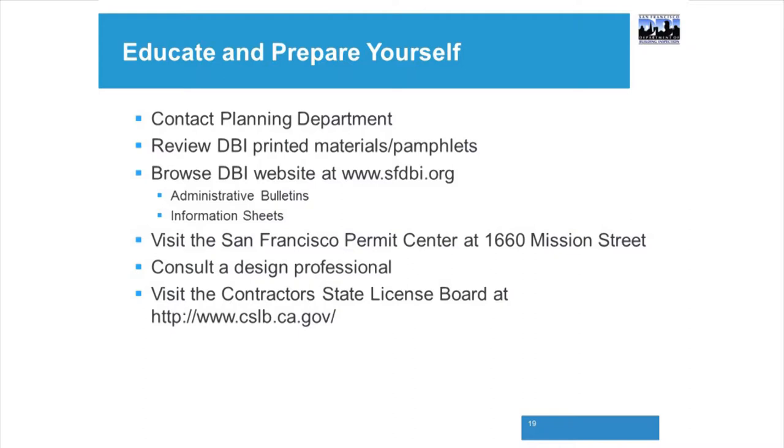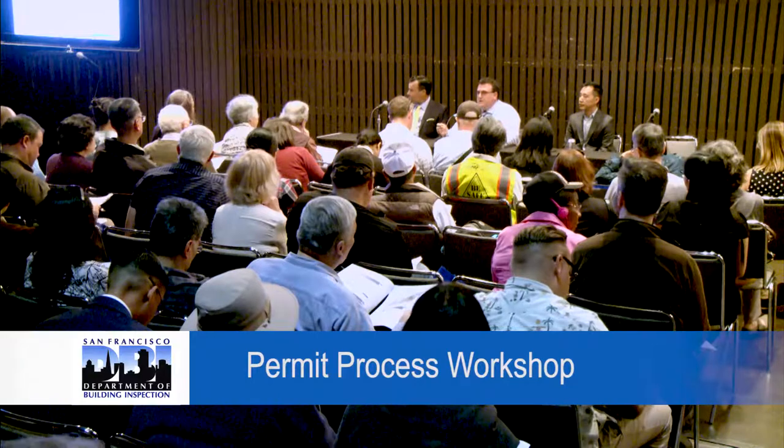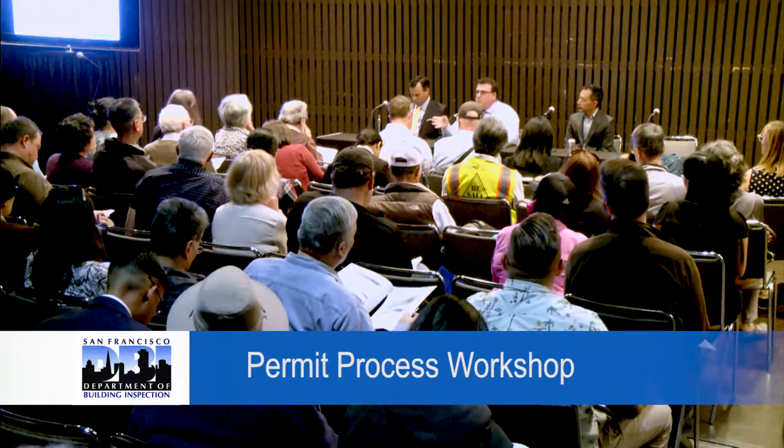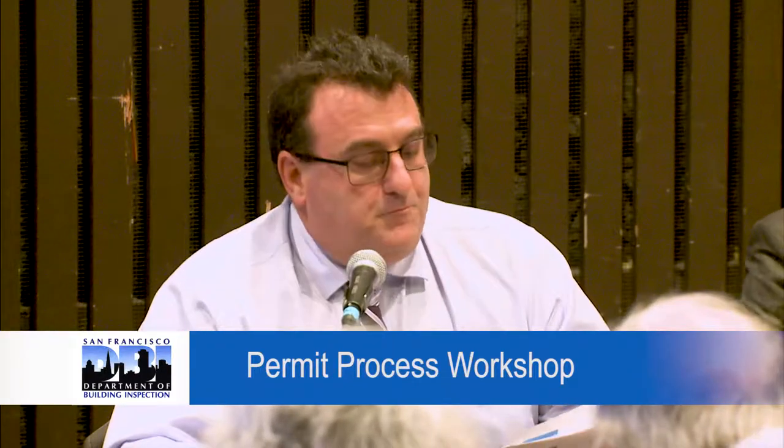You can go on the website, www.sfdbi.org, right up there. And we've got a lot of administrative bulletins on the website. What an administrative bulletin is: if you're proposing to do some work and you feel that the work you want to do meets the intent of the code but may not meet the letter of the code, you may be able to comply with the provisions in the administrative bulletin, because it'll have its own separate set of provisions. Then that may be an equivalency in order to get your project moving or get it done.